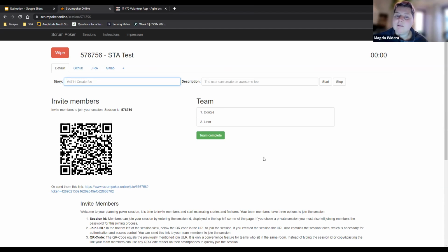So Peter, why do you think it's a 3? And Dougie, why do you think it's a 5? You would explain why you think that, both sides, and agree whether the complexity is actually lower, or the value of the work that we're going to be working on is slightly lower. The story points value, not the ticket, is lower or higher, and we agree the final story points, and we would just apply this to our Jira tickets because we use Jira for that. So, I'm going to stop sharing now, but do you have any questions, anyone?